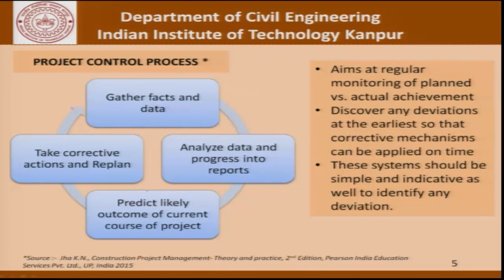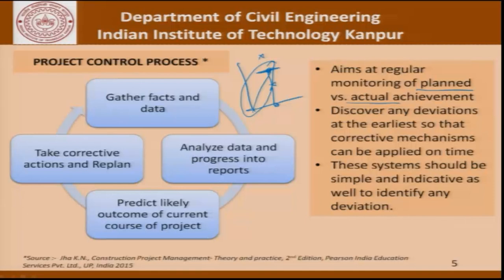The idea of a project control process is that it aims to regularly monitor the planned versus actual achievement. In a graph, if we wanted to be at a certain point at a particular time, the idea is to check whether we have reached that point, whether we are slipping, or whether we are ahead of schedule. This planned versus actual achievement is the backbone of the project control process. It discovers any deviations at the earliest so that corrective mechanisms can be applied on time. These systems should be simple and indicative to identify any deviation.